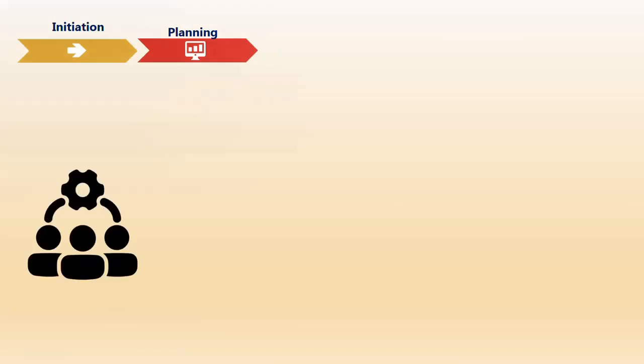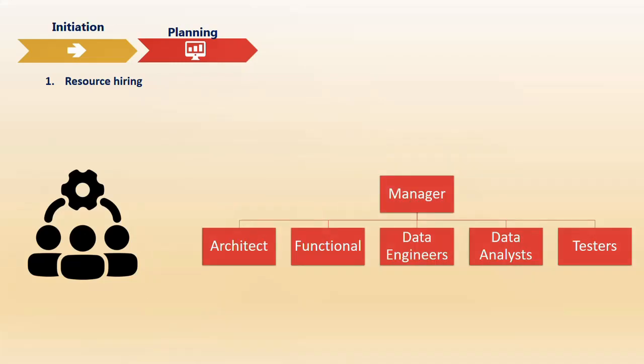The next phase after initiation is planning. One of the earliest steps is thinking about resources. The people involved in pitching solutions and finalizing contracts sit at higher levels, but actual work is done by the middle or lower layer in the organizational hierarchy. Whoever is responsible for the project will think about hiring resources for proper staffing. This is where team formation or building the team comes in. This is a typical setup for any BI or ETL project.